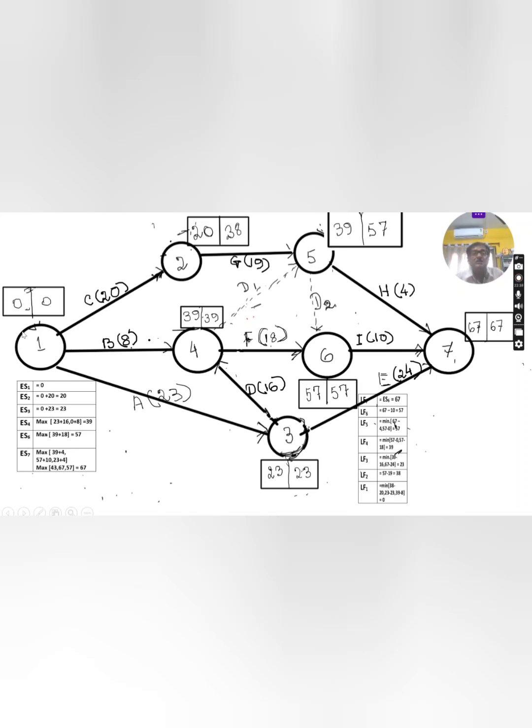Again I am repeating, how is this 0? 3 activities are coming out from this node. 1, 2, 1, 4 and 1, 3. Let us check one by one. For this node, the latest finish time is 38. To reach here, you have to complete this task. That is 38 minus 20 is equal to 18. One value is this.